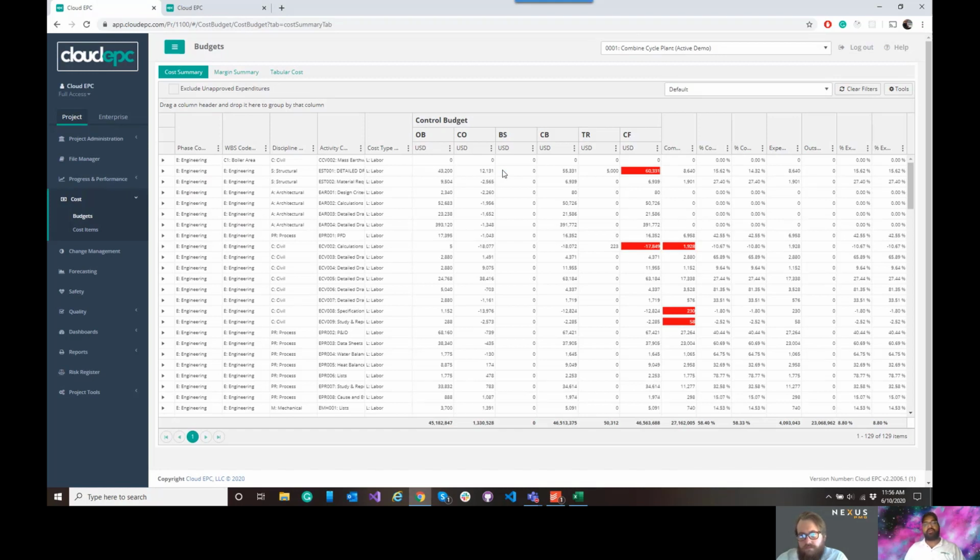From there we have our actuals, and this is where our actuals and our earned value can get really interesting, because one of the things that Cloud EPC employs is a slightly top-down methodology. And so what I mean by that is the way we commit and expend against budgeted line items isn't often the way we work package and actually track progress against those work packages. And oftentimes we'll be tracking progress at a much lower level than, let's say, the subcontract PO calls for.